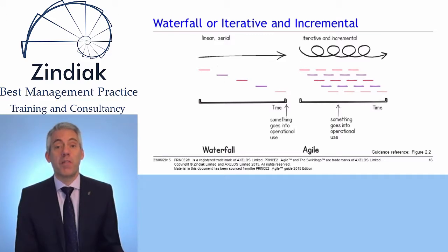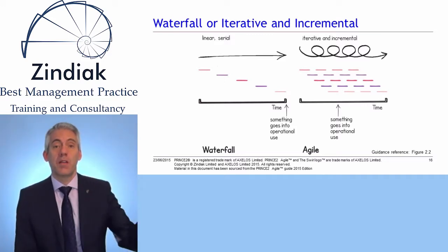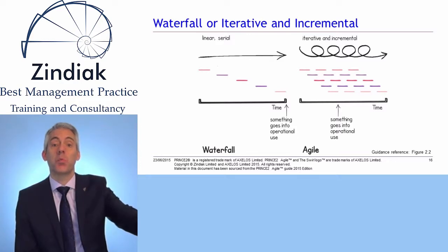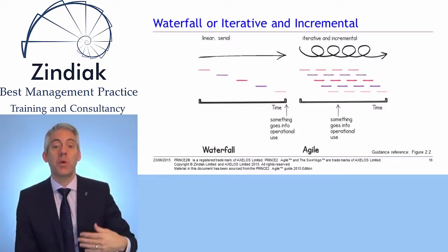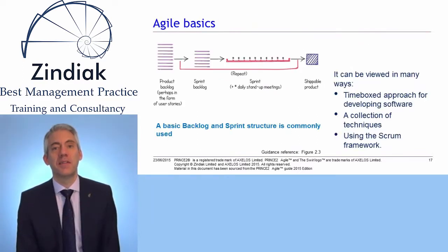As we saw on a previous slide, the project manager sits at the management level, where we'll have management stages as we do with PRINCE2. And a management stage will plan to the planning horizon. Within that management stage, we can have several technical delivery stages, and they can be iterative and incremental agile developments.